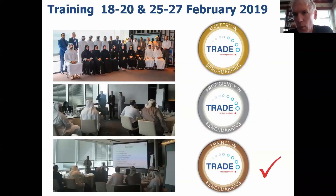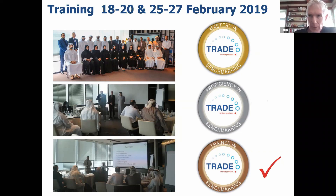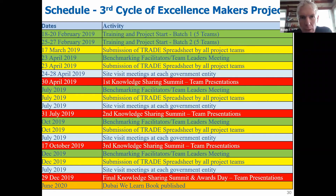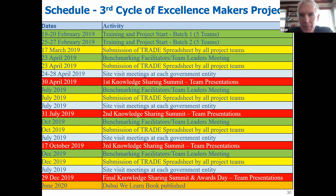I'll share how we organise a program for this, because you could do a similar program inside your own large organisation, or we could even think about doing something in New Zealand engaging many organisations. Most years we have between 10 to 15 projects which start at the same time. They start with a training program so everyone understands what benchmarking is, and then we have a schedule of activities for one year. For 2019, we ran a nine-month program — very ambitious — because Dubai Expo was planned for 2020.